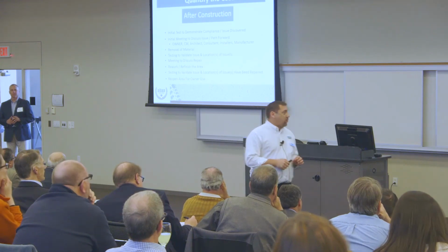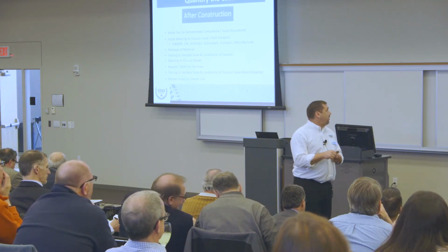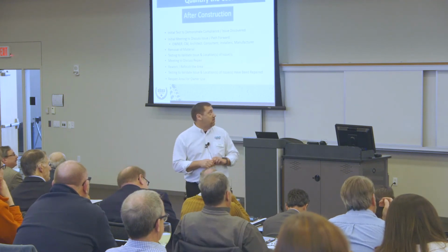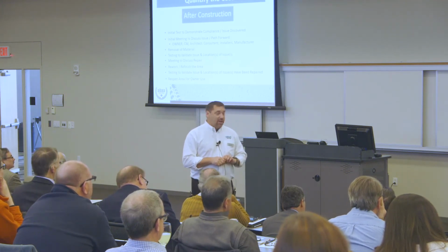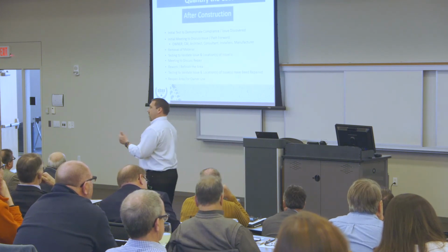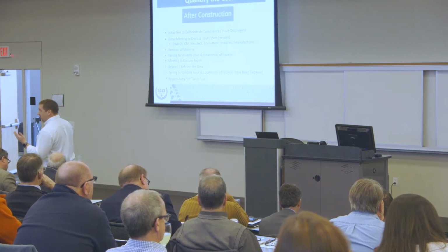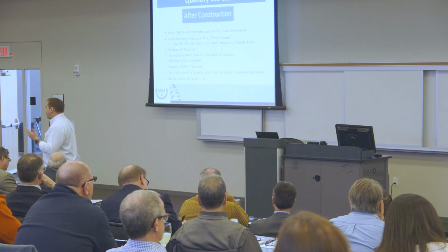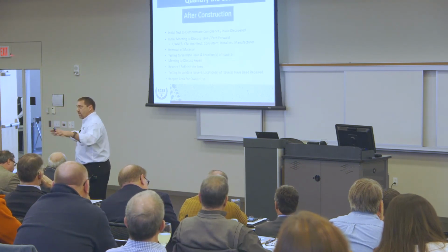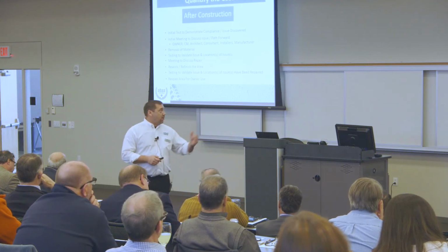Again, let's think about the cost after, if there's an issue. You have initial tests. If you're doing something at the end of a project and you have failures on windows, you have to demo stuff out. Remove things. You have a really, really expensive meeting with owners, architects, and usually these aren't the junior members, CMs, manufacturers. Marcy's not here. She would love that one. We get called in. Everybody gets called in to these meetings. Those are very expensive meetings. You have to remove material.